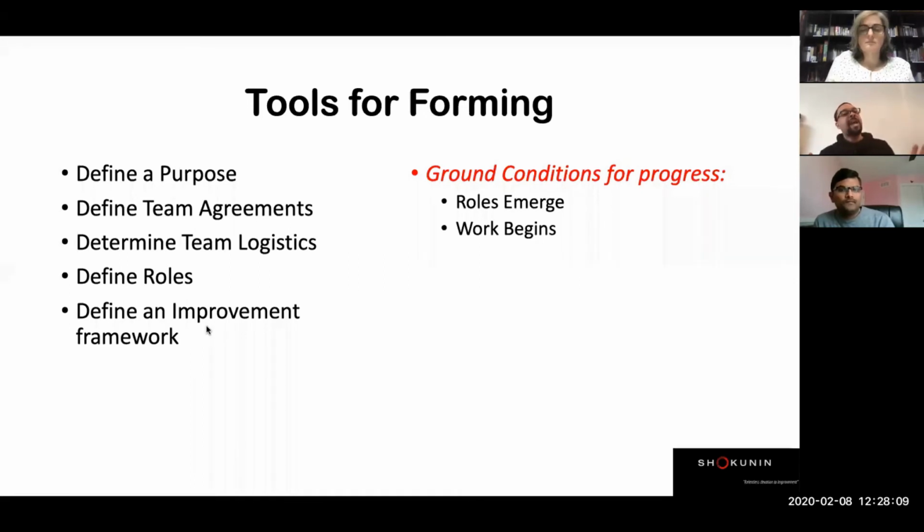I want it to be as abstract as possible in the slides and the discussion, but for me, retrospectives are the thing to do. The other thing is, if you're using Scrum or something like Scrum, don't ignore that third question in the daily Scrum. What impediments are in our way? Recognize that, call it out, and then I'm a big fan of spinning off another meeting after the daily Scrum to really focus in on that.